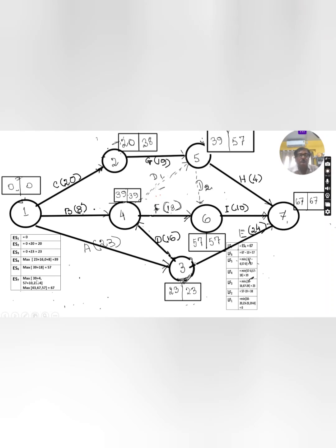If you take this one, earliest start time 57 plus 10, that is 67. And for 3, 7, the earliest start time is 23 plus the activity time 24, that means 47. 23 plus 24 is 47. Correct it, 47.